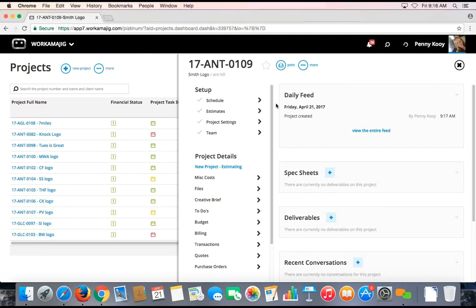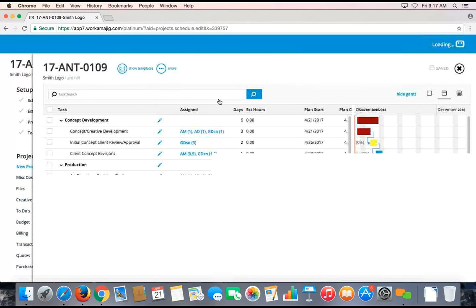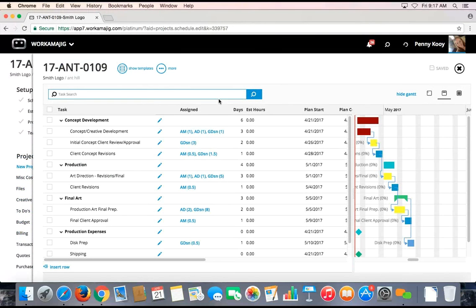As you can see, that has created a full project setup. A unique project number identifier has automatically been assigned, and there are a variety of numbering formulas you can choose from in Workamajig for this automated process. Because of the template selection that I made, this project also came with a standard working schedule for this type of project, which is now completely open for me to make adjustments based on what's unique about this project.